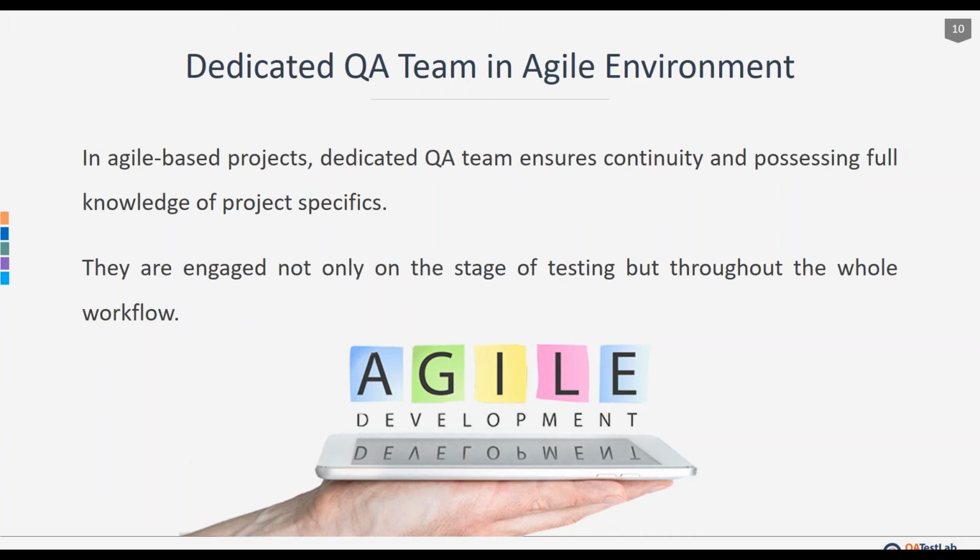A more viable option would be to enable the QA team to align with Scrum practices and function as an integral team along with designers and developers. In this approach, testers would be part of the Scrum team within the chosen team size and would be retained within the team throughout the development cycle until the release of the application. Along with the skills of the team, the QA organization also provides testing tools and platform services to the Scrum team.